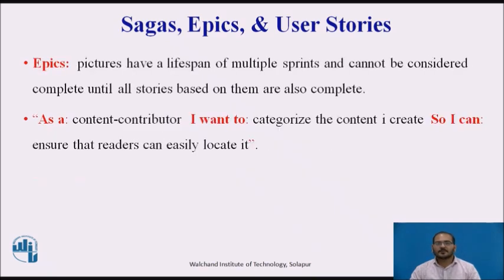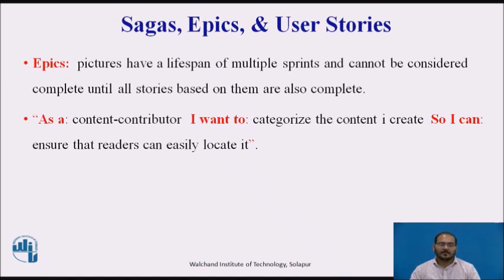The next type of story is an epic. Like a saga, epics have a lifespan of multiple sprints and cannot be considered complete until all stories based on them are also complete. However, epics have a narrower focus than a saga and, although still broad in nature, they can be completed within a few sprints. For example: as a content contributor, I want to categorize the content I create so I can ensure that readers can easily locate it. This requirement will result in multiple stories defining how content categories are defined and maintained, how they are associated with content, and how search functions utilize them.